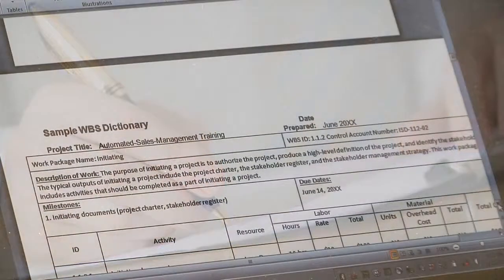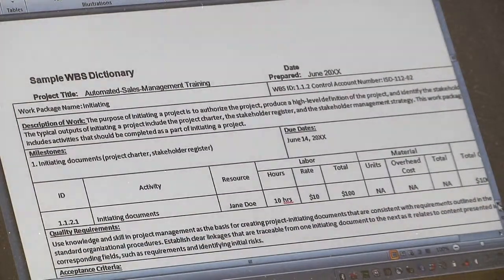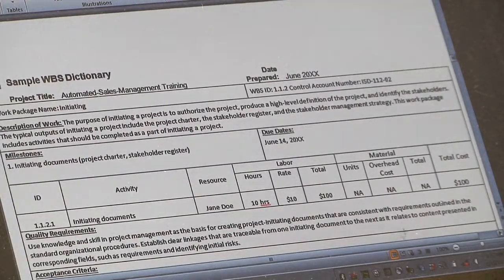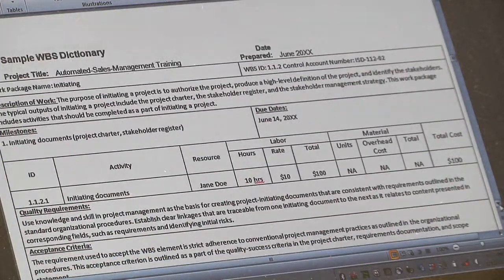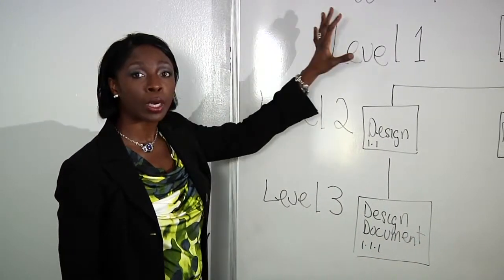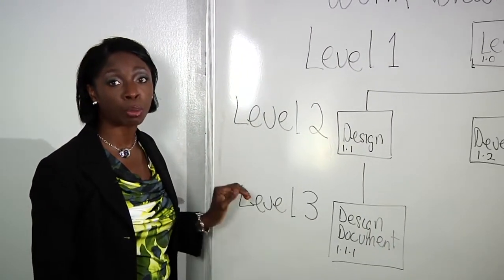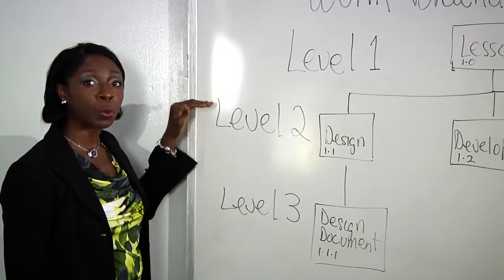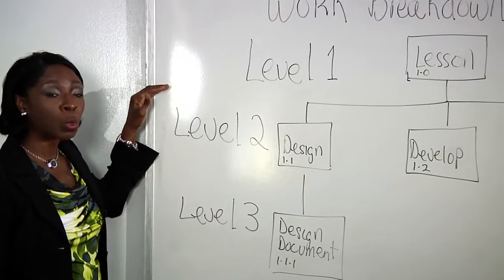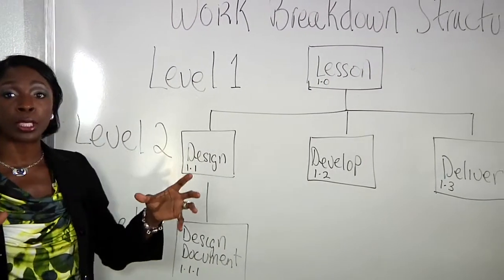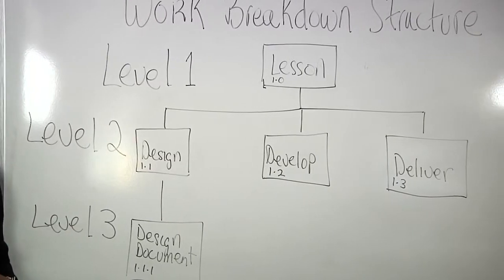The Work Breakdown Structure and the Work Breakdown Structure Dictionary identify deliverables and describe the work required for each element of the work breakdown structure. The work breakdown structure represents 100% of the work of the project. Collectively, all levels of the work breakdown structure roll up into the top such that 100% of the project work is captured.